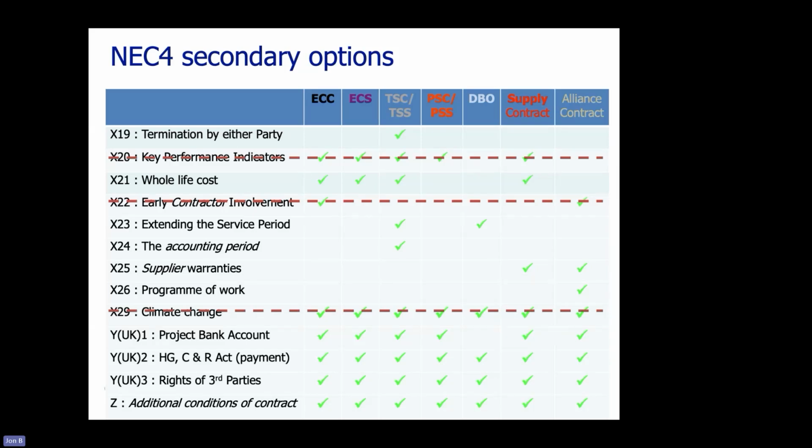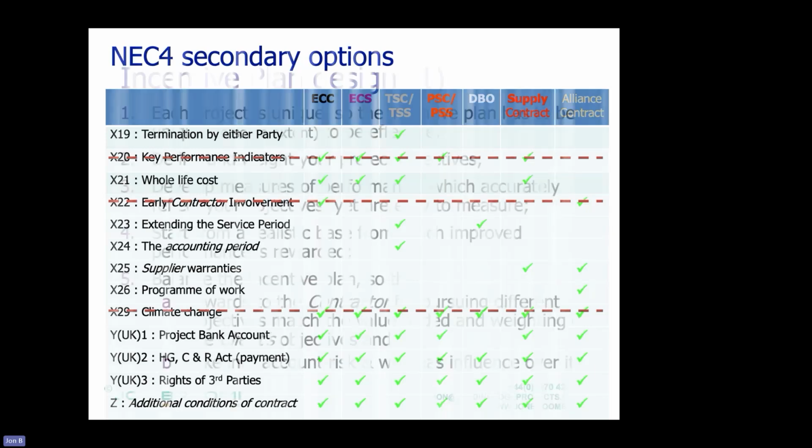So no compensation events, but there is a higher level budget, and any savings on that budget, and that includes what would traditionally be compensation events. It includes potentially client costs elsewhere in the project, and any savings, and it's savings only, are shared in pre-agreed proportions. Any overrun on that budget is all on the client. So that's the quick run through.